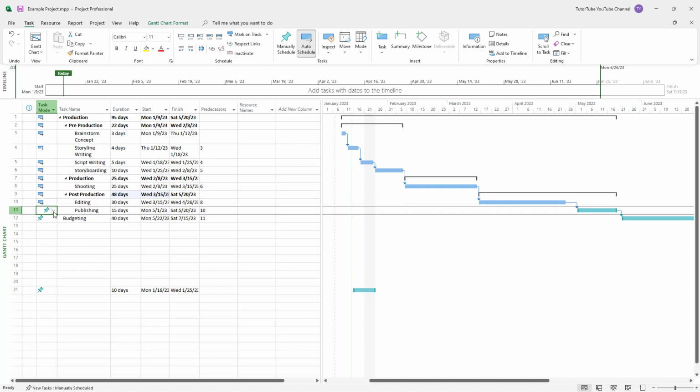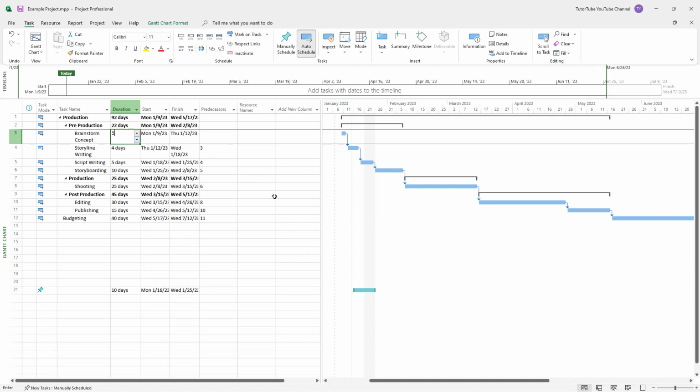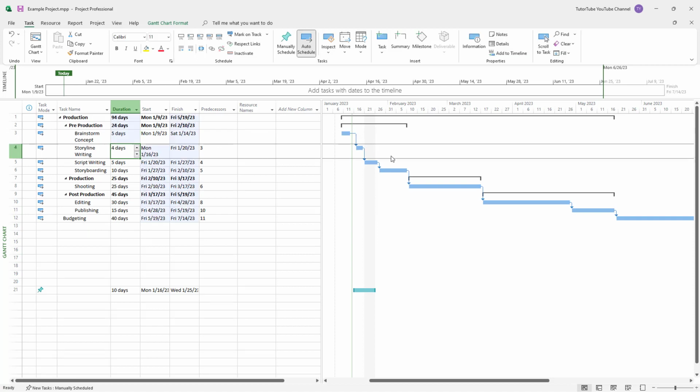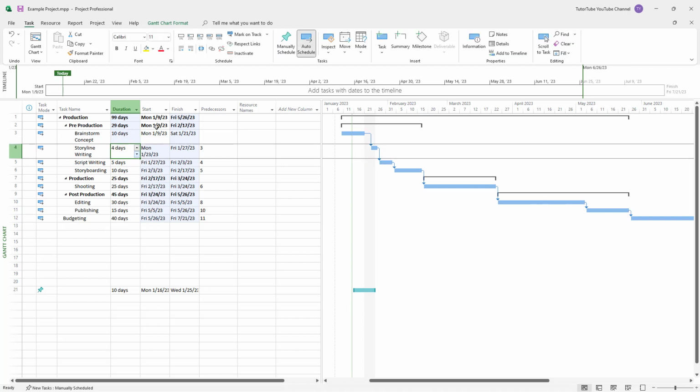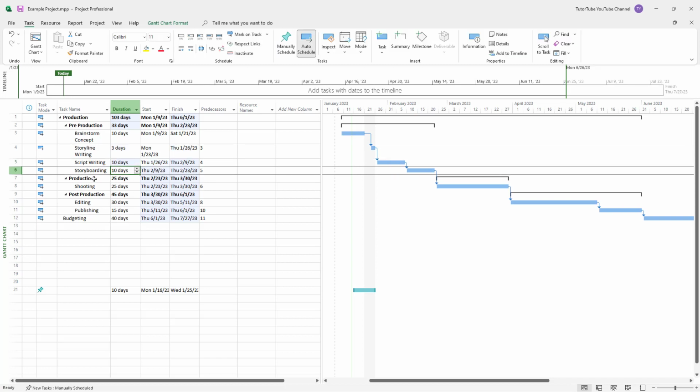Then what happens is that if I were to go around and make some changes to the task, let's say, for example, if I were to go around over here and say 5 right here, then all of the timing changes out. Go around and keep 10 right here, and you can see that all of the entire dates changes out accordingly right here. So for this one, let's just press 3 right here. For this, let's just go around and say 10 right here. So depending on the number of days, all of the data, as you can see, gets updated over here.